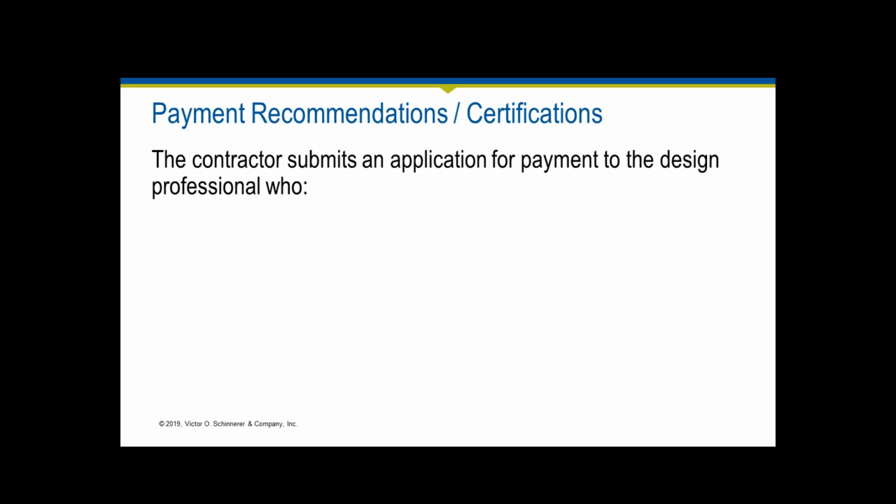Contractors obviously want to get paid as quickly as possible, but you don't want to be in a position of the owner having paid most of the money without the work in place reflecting that. That could imply a lot of different things, and that's a problem. So if you have this responsibility, you want to make sure that you're taking enough time to provide the service, that you are indeed aware of what's going on site, and can make a determination independently of what the percent completes are, because you're expected to perform as an independent, verifying what the percent completes are.